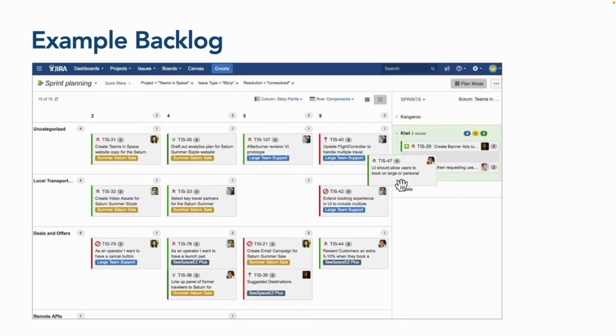So this is an example of a product backlog, and the tool that's being used here is Jira. Now Jira looks a little bit different from this now, but you can't really go into an enterprise environment without seeing Jira, as it's such a commonly used tool, or something very similar to it. So essentially it allows you to break down the different tasks and product backlog items that the team is working on so that you can clearly see the status as the team works on those items, and those items can be moved through the different status stages through the sprint.